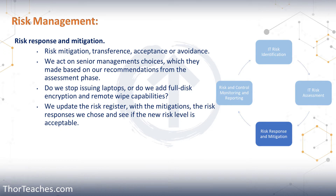We might have staff that are going out and doing remote sales, or we might have engineers in the field. In that case, not issuing laptops is probably not an option. Here, we might choose to do what we talked about in the previous lecture — qualitative and quantitative risk analysis — where we add encryption to the laptop and add remote wipe capabilities.